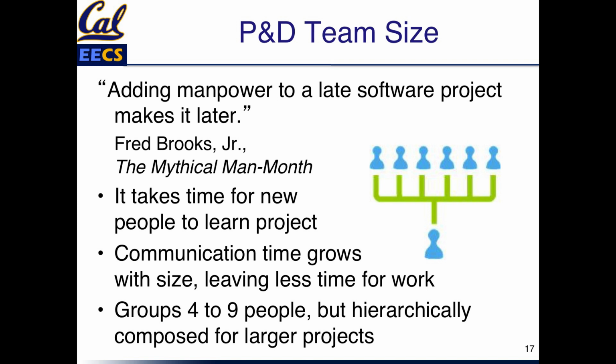What he said is when you bring new people on board, it takes time for them to learn the project, so it takes a while for them to be useful. And then communication goes up with the number of people in the project. So the bigger the project, the more time you spend communicating, the less time there is for work. So you can scale up to bigger groups, but they tend to keep groups not too big so that they don't spend too much time in communication, and then you scale it up hierarchically.